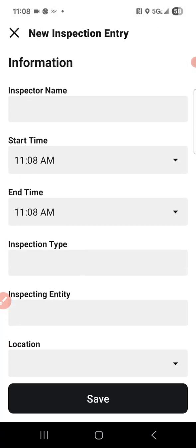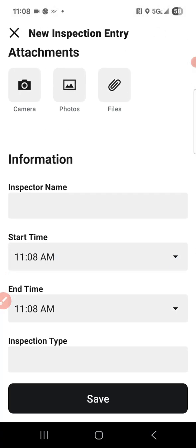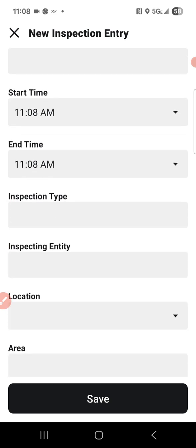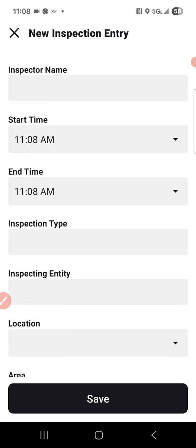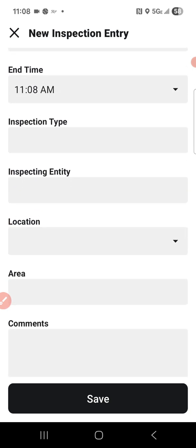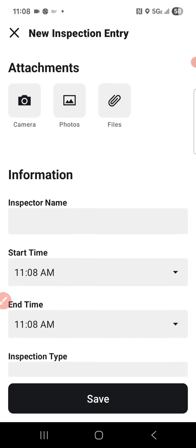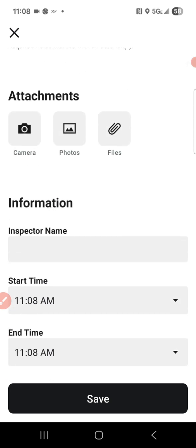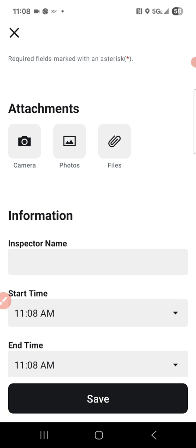Inspections could be either a safety audit, or us inspecting the material as it has arrived, inspecting the material as delivered. Anything to note that just says that we put our hands on it, we saw it, this is how it was left, helps document site conditions. That way, if there's ever anything that comes back, we have this information loaded in, and it's all in one easy to find place that we can reference.